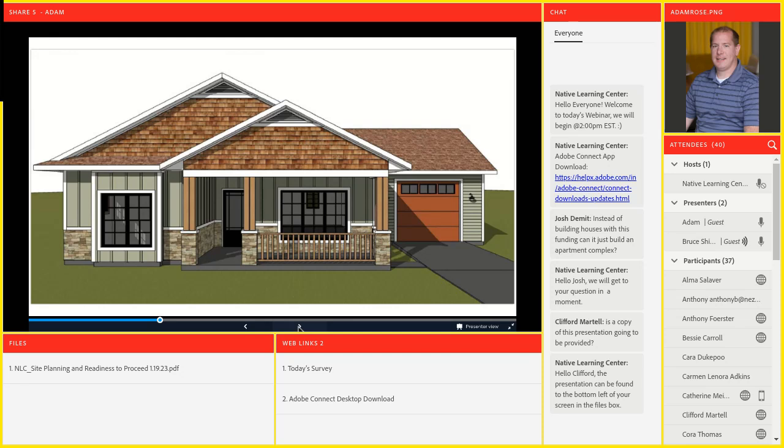Dry Creek agreed to pay the upfront capital cost to put in the sewer lift station and the increased size of the water mains to handle the surrounding properties. And at some point, there's a reimbursement agreement that the city is working with Dry Creek on. As future properties develop, they will contribute back to the city, and the tribe will be reimbursed for those out-of-pocket expenses.